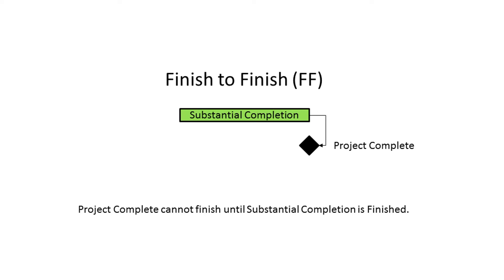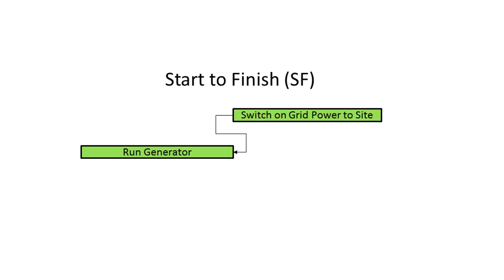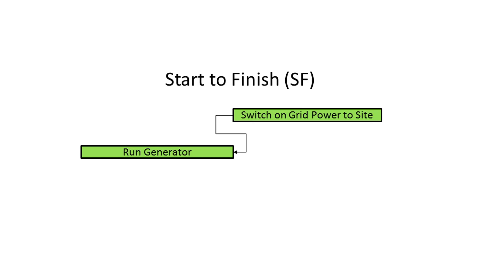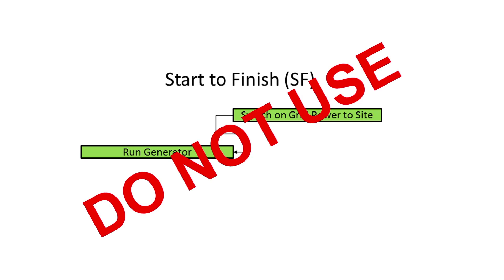The last of the standard relationship types is start-to-finish. Start-to-finish is rarely used in most industries. It states that the preceding activity cannot finish until its successor starts. This can be a slightly confounding relationship type when first encountered. The following example states that the run generator task must continue until such time as power from the grid becomes available on the site. Because of its generally confusing nature and a lack of real-world situations where this can be applied, use of this relationship type is actively discouraged in many scheduling guidelines.